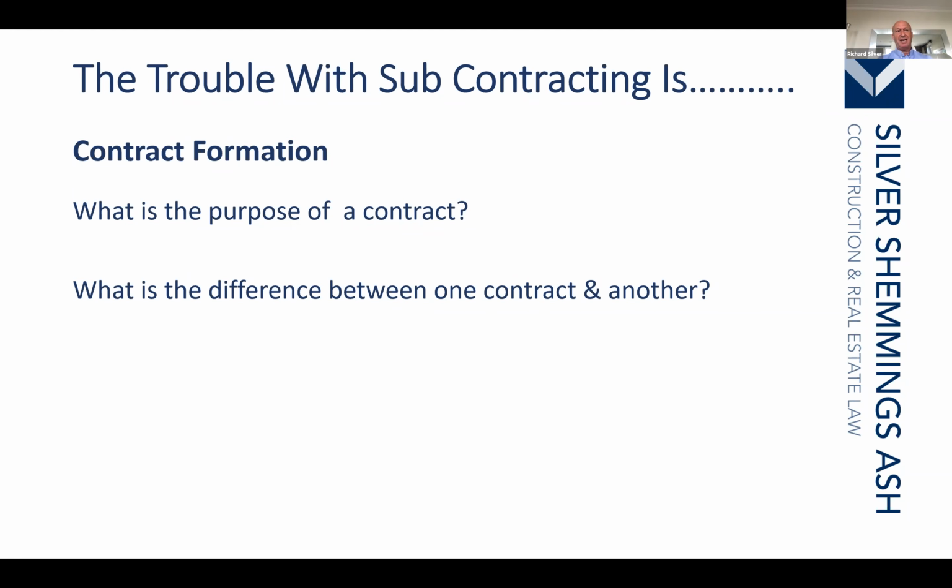Under the JCT standard form and the subcontract, if you use the JCT subcontract to pass down those provisions, the contract provides that the contractor, and hence when passed down, the subcontractor, is responsible for the development of the design. But they're not responsible for the base design upon which they are to develop. So the employer has initially gone out and worked out their employer's requirements. Under the standard form, the employer remains responsible for those, and thereby the contractor, when placing their subcontractor, remains responsible for those. But all too often that is revised.